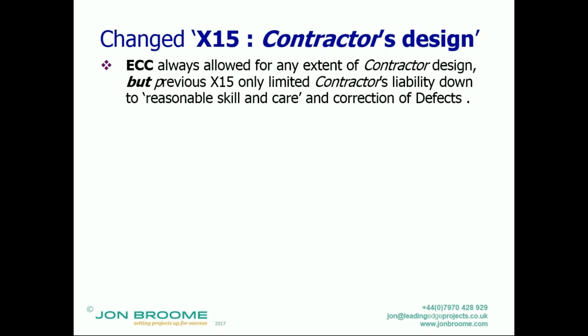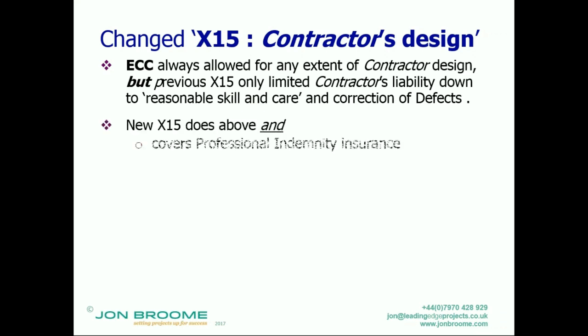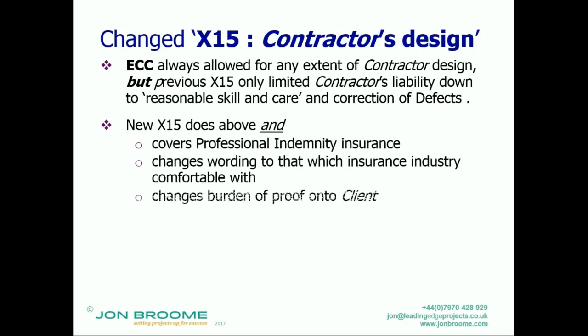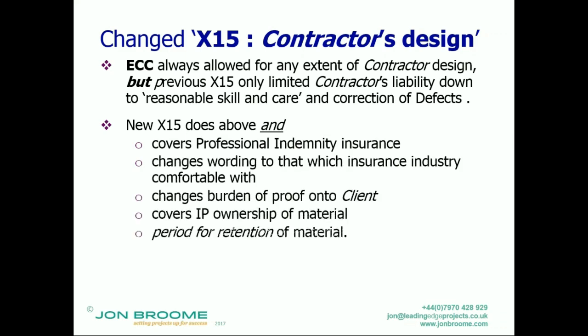So this reduced a contractor's liability, who would probably be subcontracting out the design, to the same level as that of their consultants. So it limited it down there, and correction of a defect which was in the gap between reasonable skill and care and fitness for purpose was due to design was also a compensation event. So X15 now does the above and covers professional indemnity insurance.